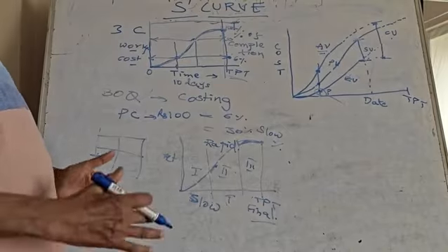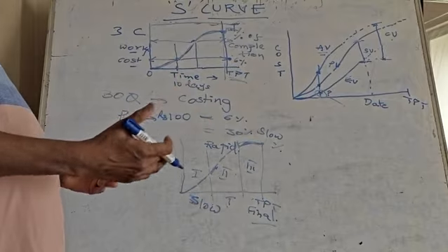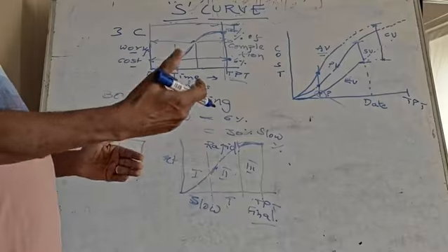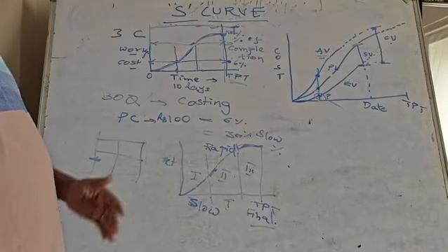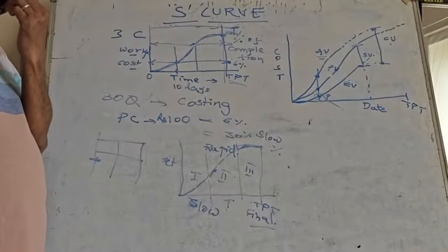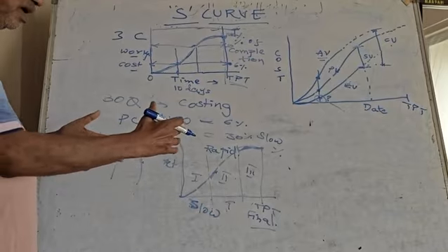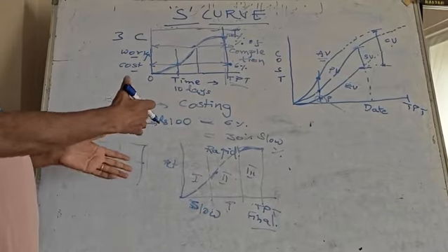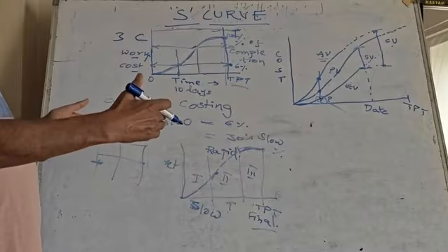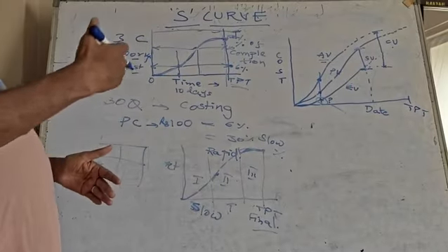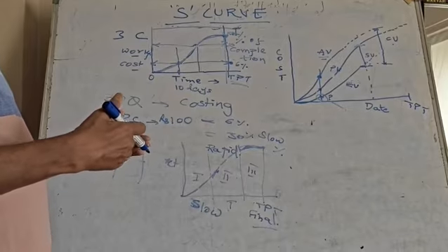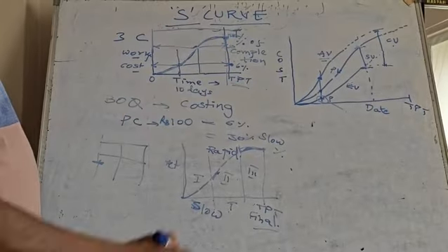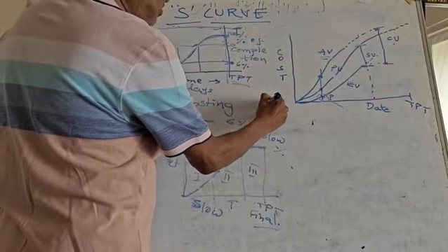What you can do is go to the next diagram, that is called project crashing, and you can try to crash the project. That means you can put more resources into this: money, manpower, machinery, and duration, for example. Many people resort to different shifts, maybe 2 shifts per day, 3 shifts per day.